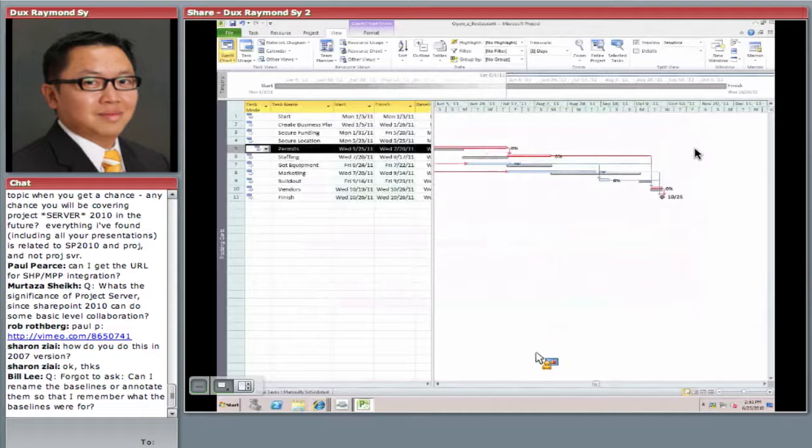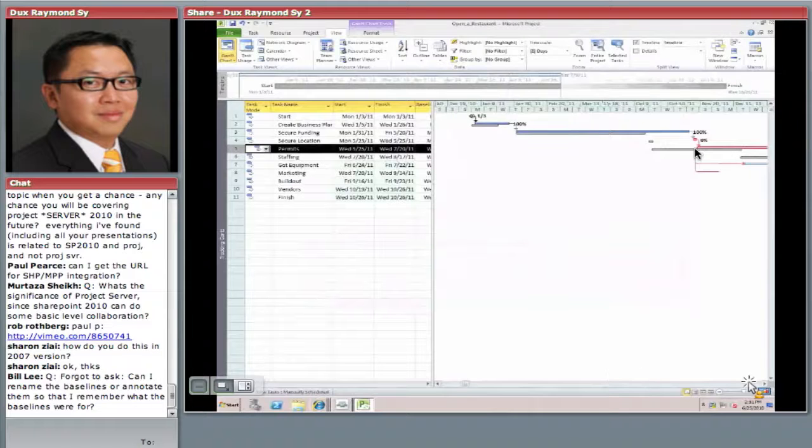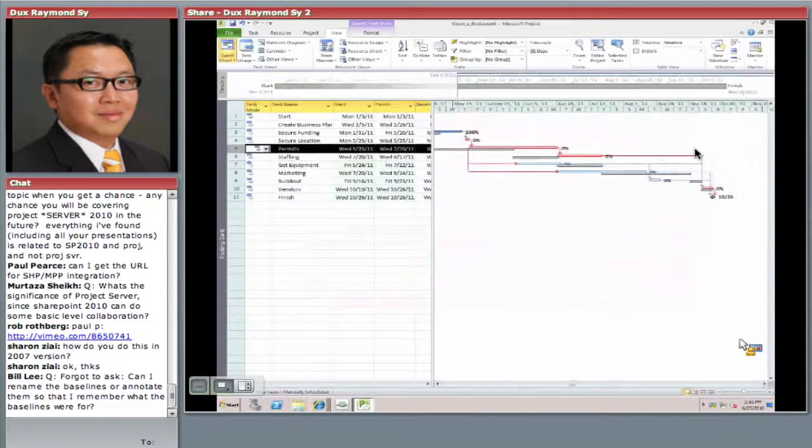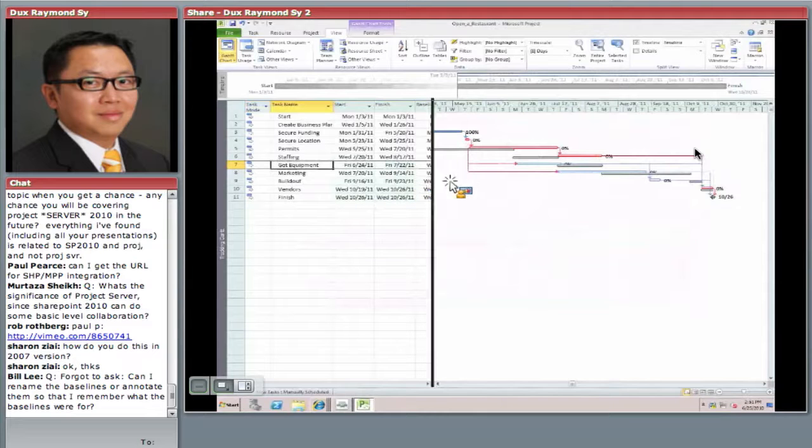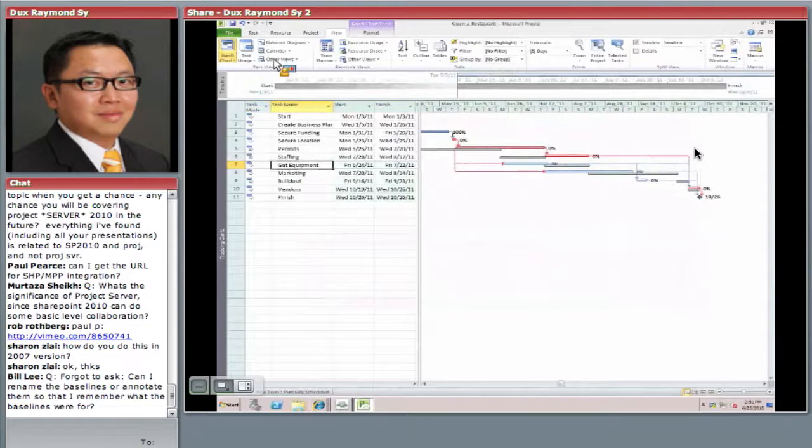See that? So what I did is, because I'm running the project now, I need to correct it. I need to correct it because I don't want it behind. So I said, look, two days into getting the permit, I'm going to start getting the equipment as well. But again, I'm introducing risk. If I don't get approved, I might get the equipment with no restaurant. So that's what I mean by correcting. So you constantly do that, right?